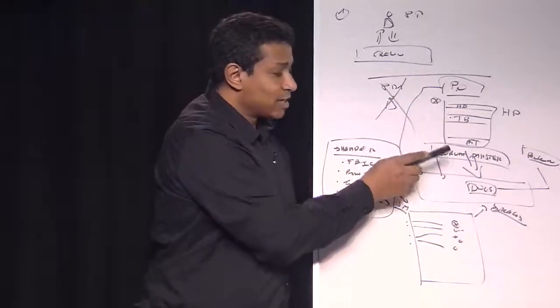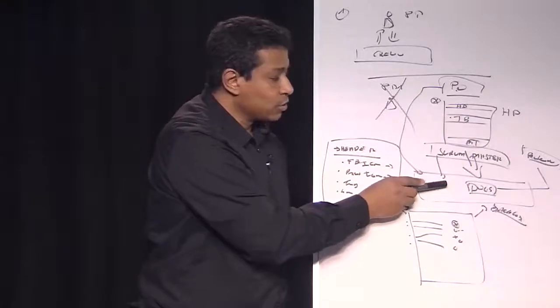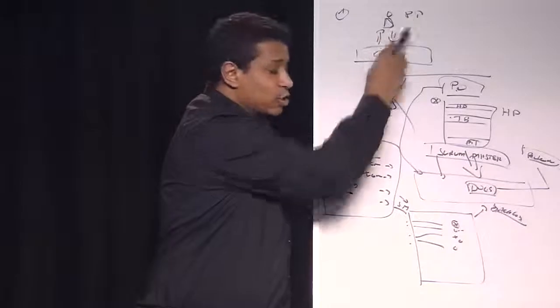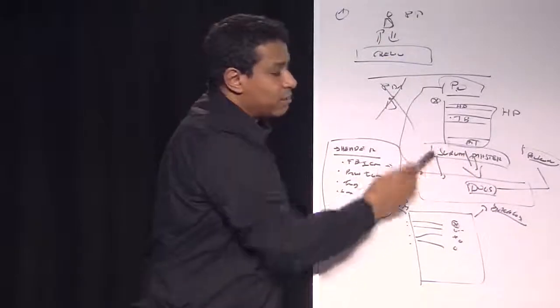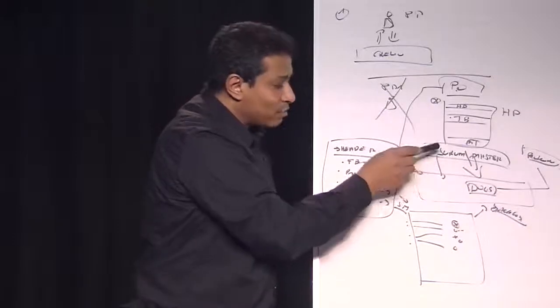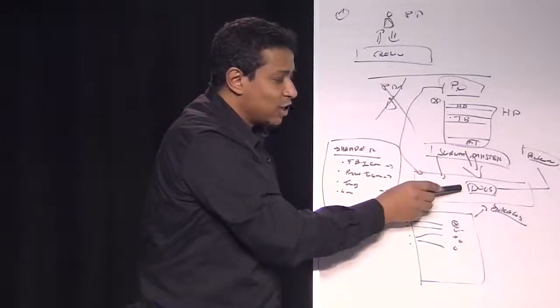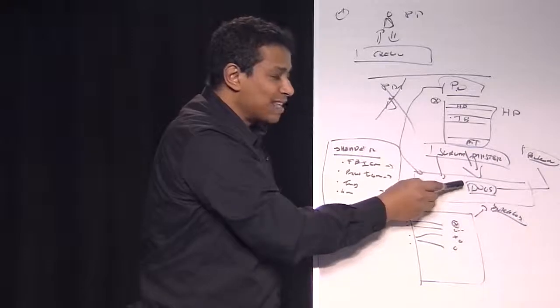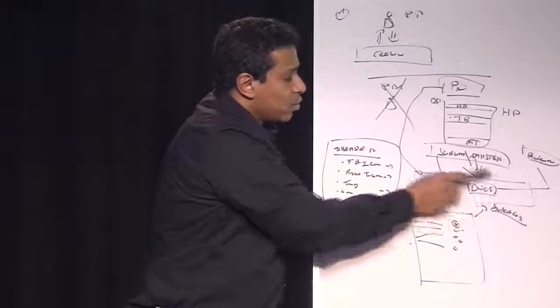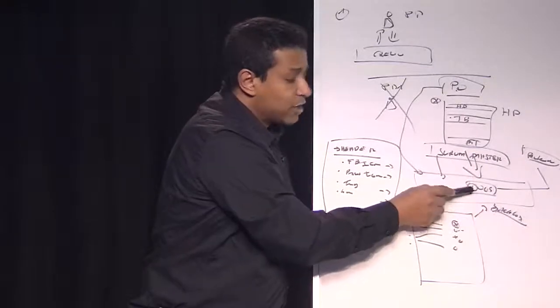But the Scrum Master belongs, and has to belong, to the dogs. The Scrum Master is not a project manager because he hasn't got the power to tell the dogs what they have to do. He just has the power to discuss with the dogs, to know exactly if they're okay with this. This is the role.